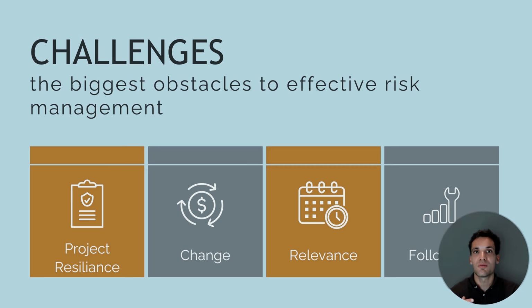And finally, the most common issue you see with project risk management is people simply going through the planning process. So they identify the risks, they analyze the risks, then they plan the responses, but then nobody does anything about it. The responses never actually get put into action. That's why having a proper follow-up sequence, keeping people accountable, making the risk management process really, really easy and doing it at regular intervals, we're just going to see better results because there's going to be a much more likelihood that the risk response plans are actually implemented.